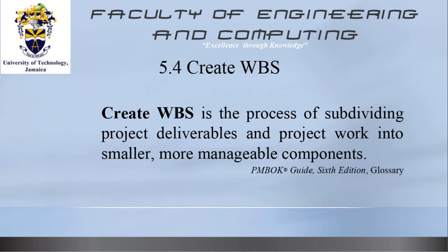So the superstructure being constructed is one, but then for the procurement and installation of windows and doors, another team is doing that. So every key feature of the building is being taken out and broken down. It is part of a whole, but you are putting it in what we will later call work packages. We will soon get to that.